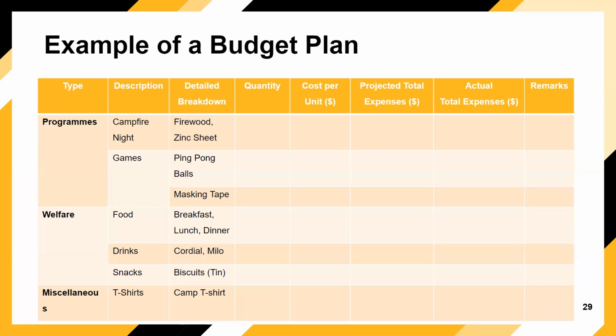So for example, if you know that you need ground sheets for two different activities which will be executed at different timings, you can coordinate and reuse the ground sheets instead of buying or indenting another set. It's worth noting that it will be easier for your planning team or whoever's reading your proposal or slides to reference your budgeting plans to your logistical needs conveniently. Because like what I said, the previous batch, what some of them did was to put a budget plan and a logistic plan separately. So it was quite confusing to go to and fro, but you can just combine them together or put them side by side for easier reference.